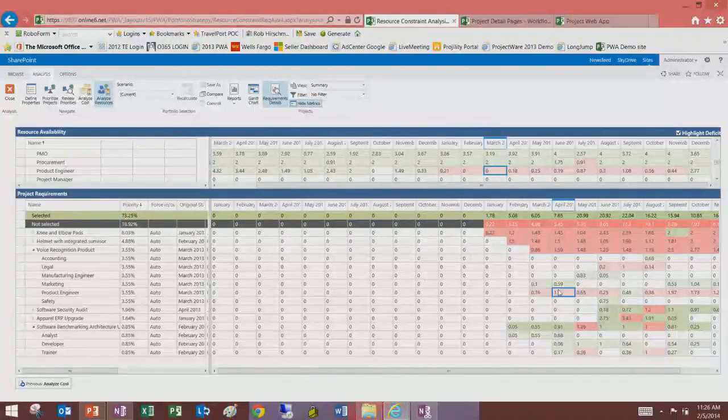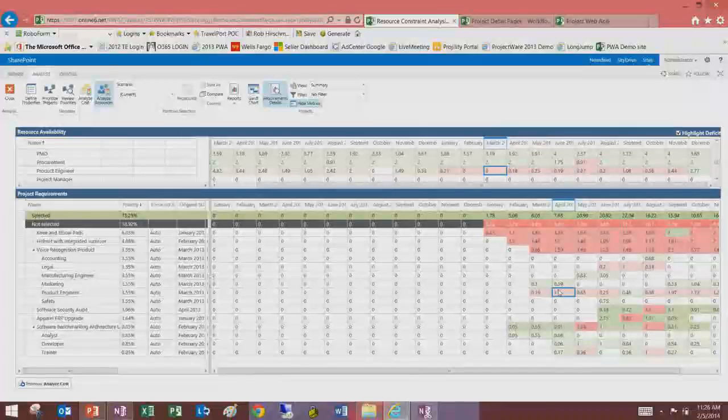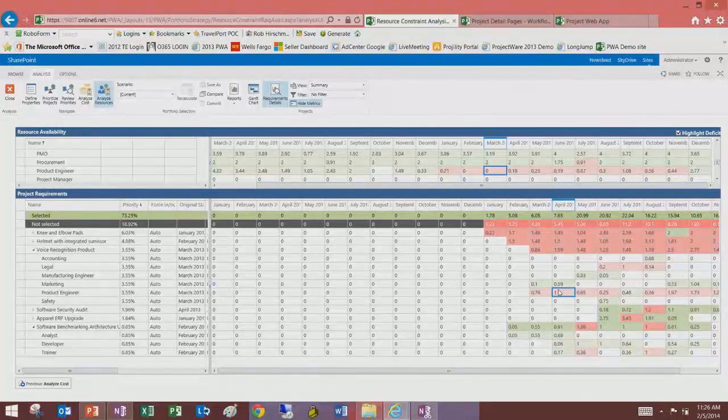The key is that resource plan. When I set up the portfolio, there's the option to use the resource plan to drive this. And if I check that box, then I have to have those resource plans, which is going to drive all of this. It's a key part of that process. Otherwise, this part of the tool doesn't quite work as well. Okay.